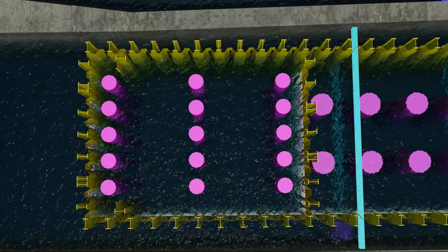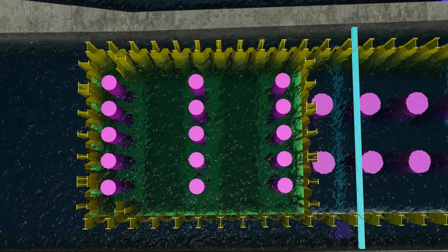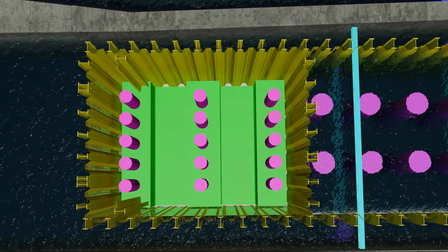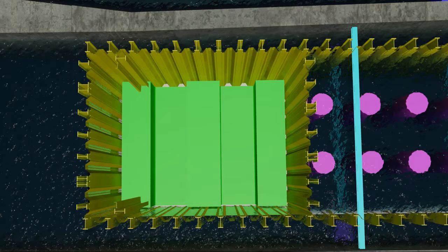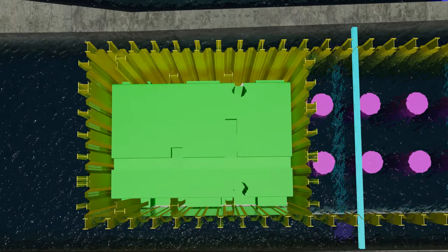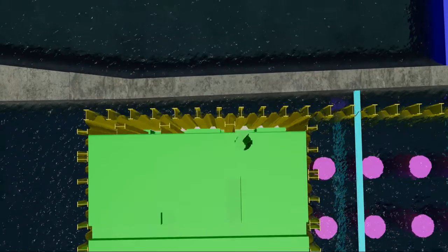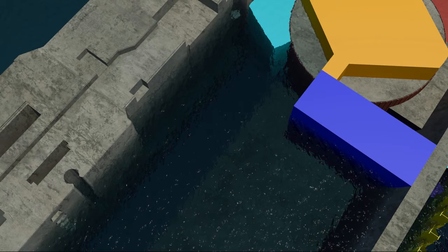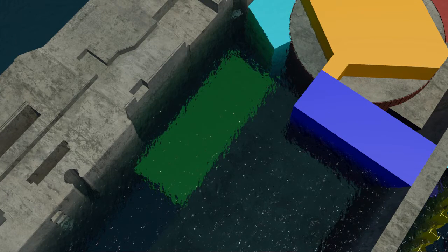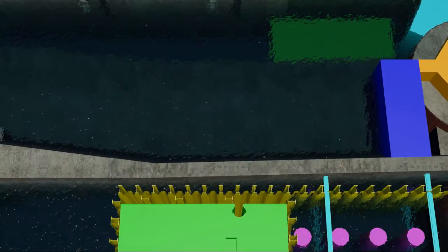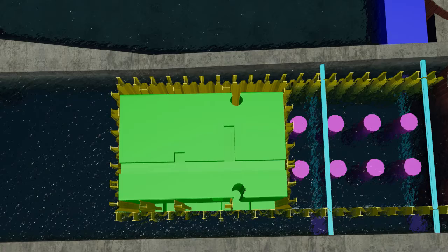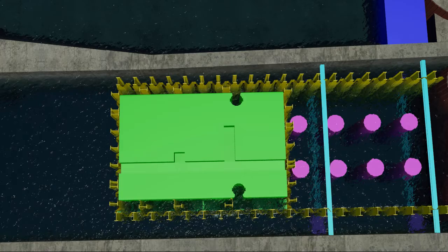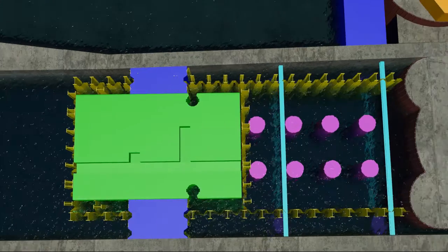We place the tremmy concrete inside M22 coffer box and install the culverts, dewater the coffer box, remove the drill shaft casings, and place monolith wall M22. We then place tremmy concrete between the existing river wall and the existing diaphragm. Flood M22 coffer box. Install M22 closure.